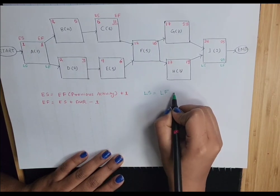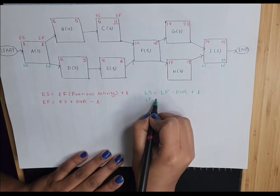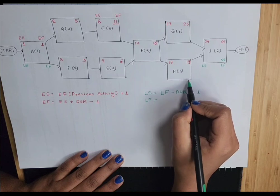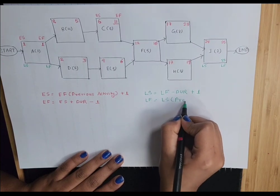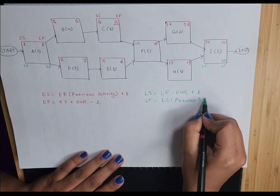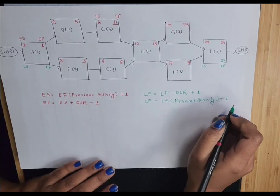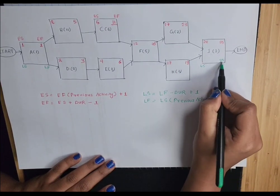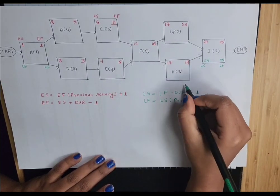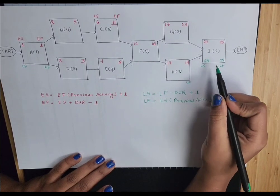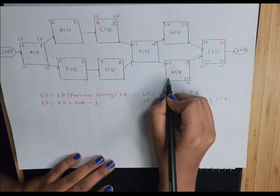The formula for late start is: late finish minus duration plus 1. To calculate late finish for an activity, it is the late start of the next activity minus 1. For example: late start 24, then 24 minus 1 equals 23 for late finish; and 23 minus 3 plus 1 equals 21 for the late start of the preceding activity. Just like this, you calculate for each activity.